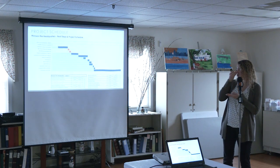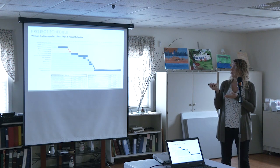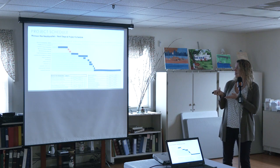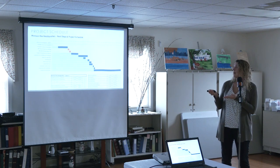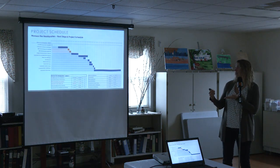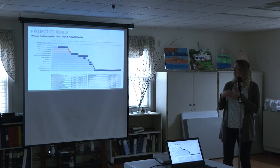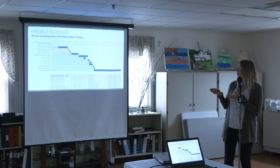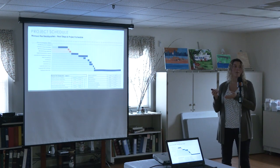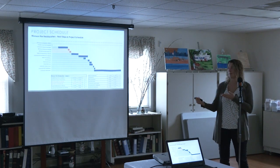So this project schedule, or potential project schedule, includes that Springtown meeting presentation and potential vote, as well as the debt exclusion ballot vote. We would then proceed into design development, construction documentation, and then bid the project and receive those bids, and potentially then proceed into construction. So that would bring you out into about April or May of the following year the project would be completed. So that would be 2025.